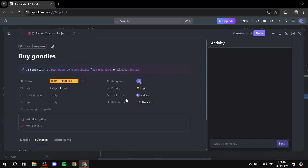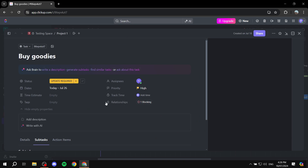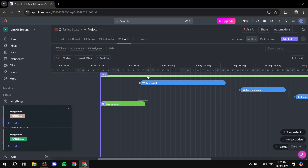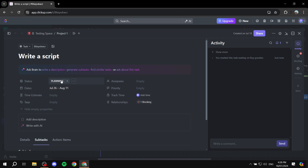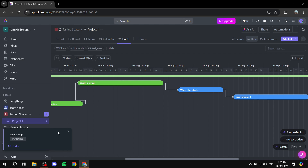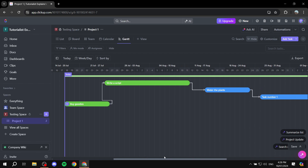This is pretty much all there is to it. You can see it is blocking 'writing scripts' because it needs to be done. If we select a task and mark it as complete, we can see it turns green and the blocked task is no longer blocked. We can keep doing that — marking tasks complete and watching the chain update. This is how to use the Gantt view. It's very beneficial when you know what you're doing — you can view the timeline and connections between tasks all at once. I hope you found this video helpful. Thanks for watching.